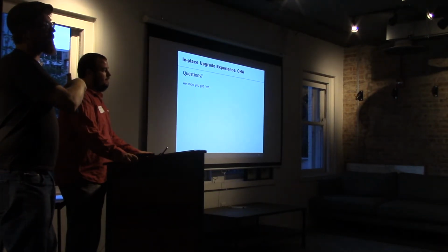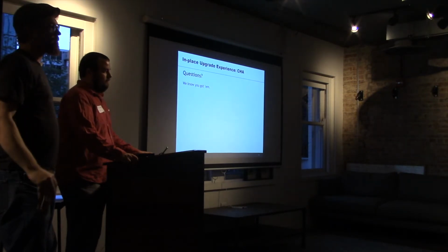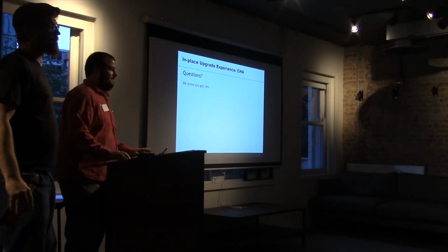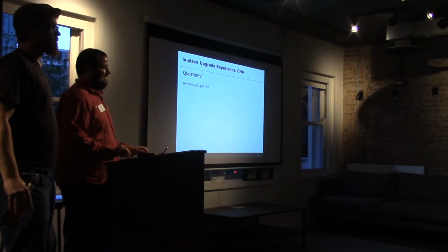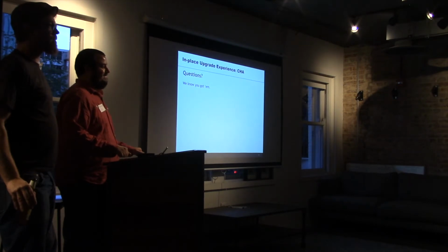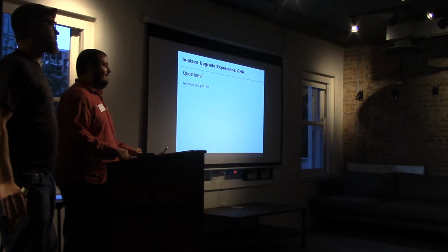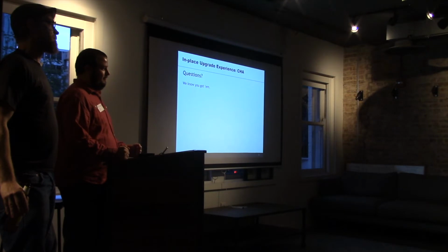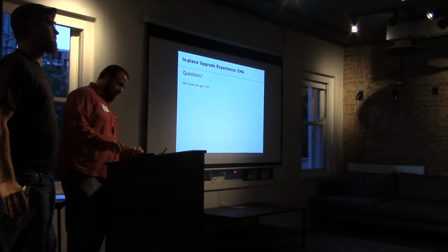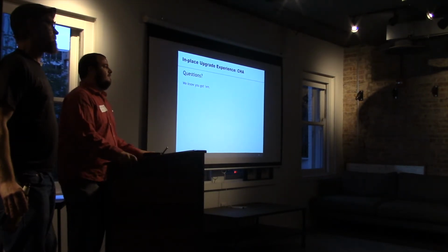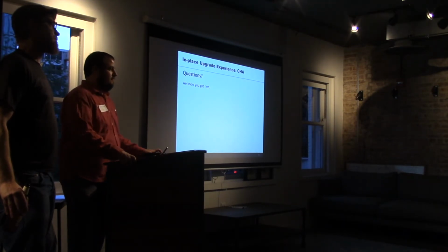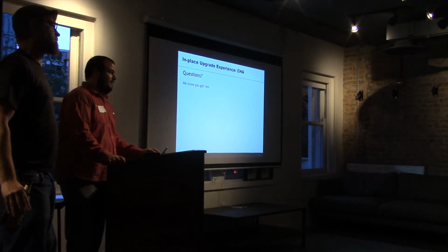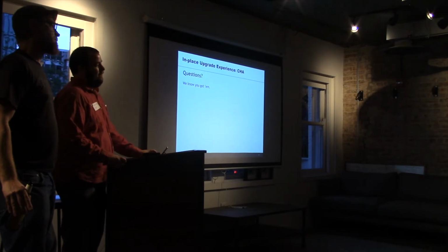One of the interesting things that we ran into that I remember was you guys had mapped out this great upgrade path. Like, here's how we do the database update, and here's how we do the code versions, and we can even skip some steps in here because we can do some shortcuts. And then we took a look at EXM, and we realized that, oh my gosh, EXM's essential versions, which are the versions you have to hit, do not align with the essential versions of everything. And if you actually put those things side by side, you realize, oh my gosh, we really do have to hit every single step when we think about the module and the Sitecore.